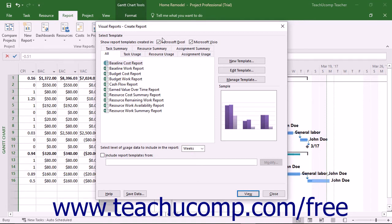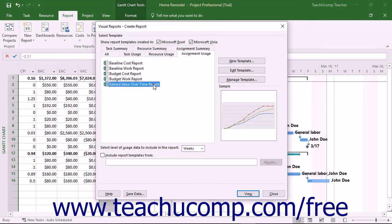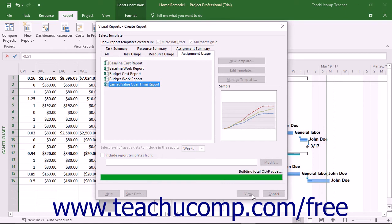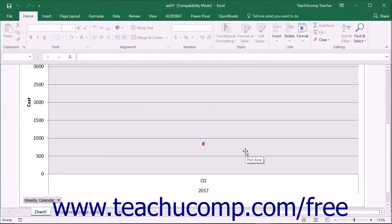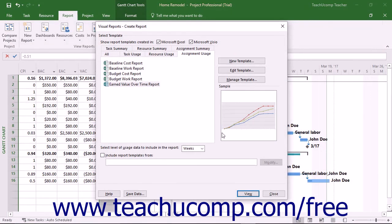You must also have Microsoft Excel installed on your computer. To open the Earned Value Over Time report, click the Assignment Usage tab and then click the name of the report to select it. Click the View button in the Visual Reports dialog box to open Microsoft Excel and show the resultant chart and pivot table for the report. After the report appears in Excel, you can manipulate it to show the desired data. When you are finished creating reports in Microsoft Project, you can simply click the Close button within the Visual Reports dialog box to close it.